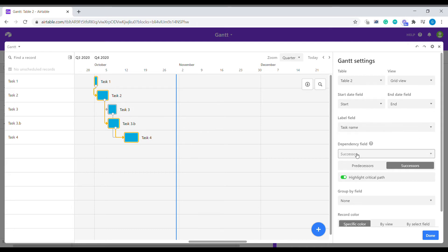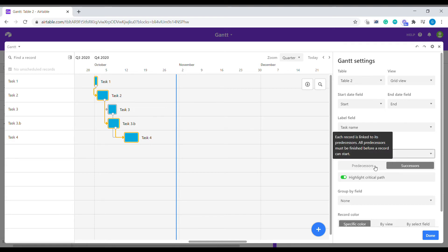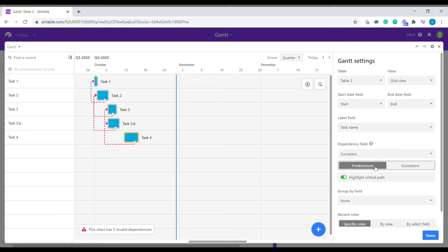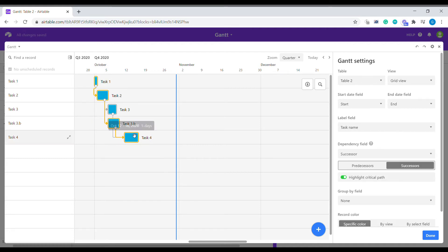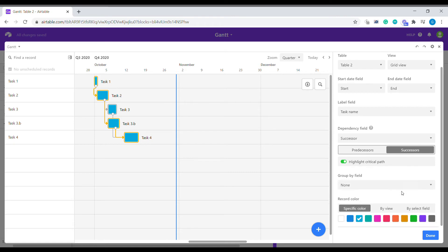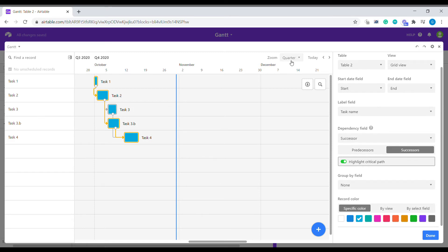And here we need to remember it's important to select whether this task is a successor or whether this is a predecessor. Predecessor means it will be linked differently. So in our case, we are selecting successor because that's what we have decided. And we are highlighting the critical path for the whole project to be concluded. So we're going to do done.